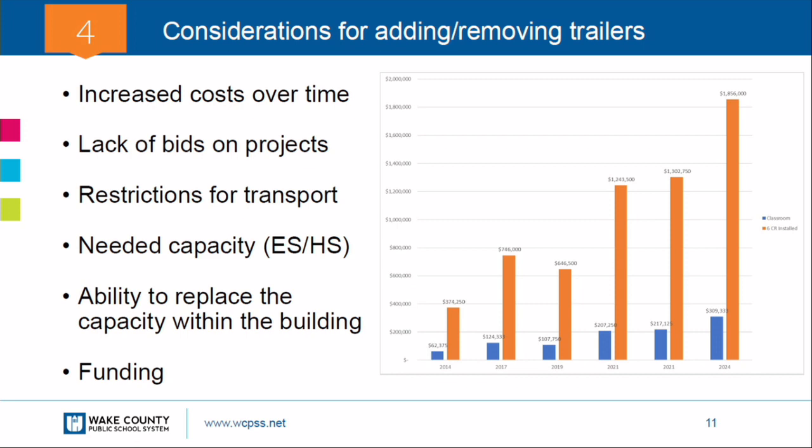And to even develop those plans is not free. Each individual plan, what is all that? You're going to have to do feasibilities to see if it works, if it fits. You're looking anywhere between $50,000 to $100,000 for them to do a full assessment of the site to see what works. But I know you mentioned in some of the slides the amount that we spend, I think it's $792,000 a year in annual maintenance on some of these. It's a matter of putting money in one place, but it's not really solving the problem, it's more a Band-Aid. If we permanently fix it in another spot, yes, it may cost us more money, but in the long run, is it going to be better and save us money?